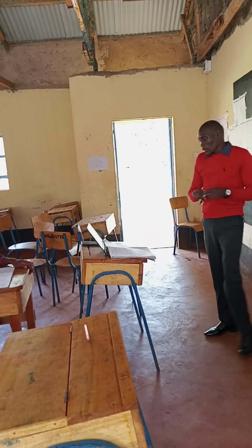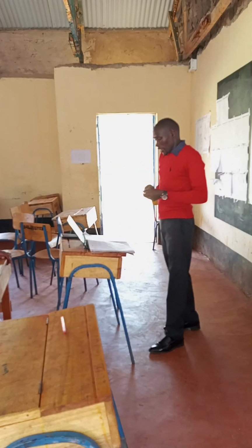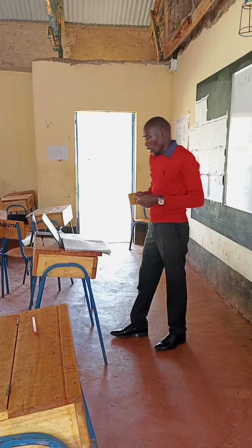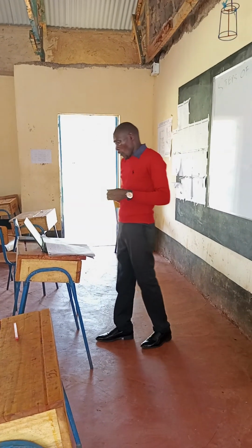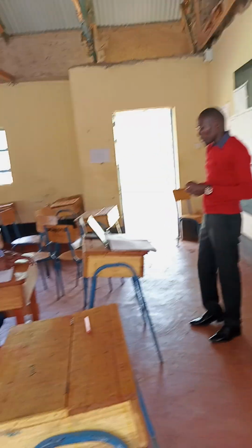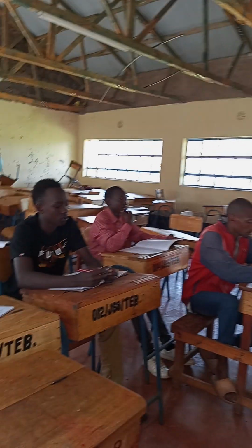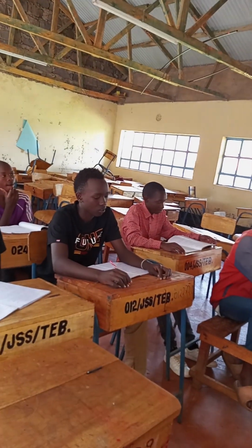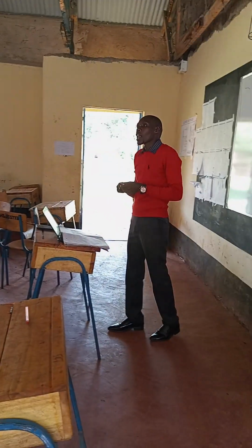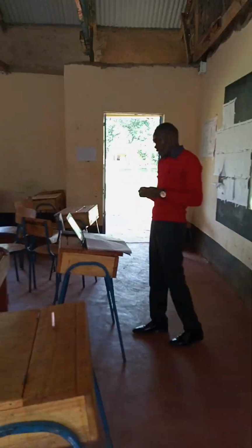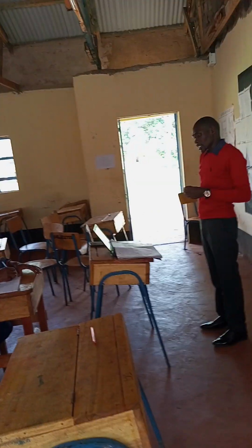Okay, we have 10 steps, and the first step is site inspection and planning. First of all, you have to visit the site of the workplace. You also have to understand the building layout and user needs. You also have to decide locations for outlets, switches, lighting points, and DPs. You also have to choose the appropriate wiring systems, such as conduit and trunking. And that is the first step.